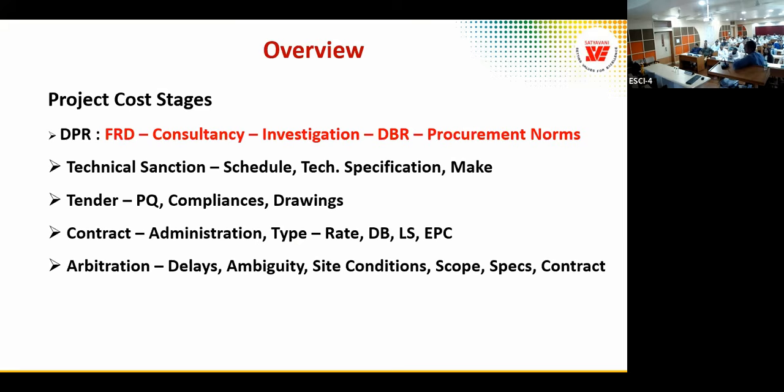Next is the technical sanction. In the technical sanction, we have to freeze the schedule. Schedule means schedule of items. You have the schedule of rates, you know, the SOR. In the SOR, I define the schedule, actually, the schedule of items.